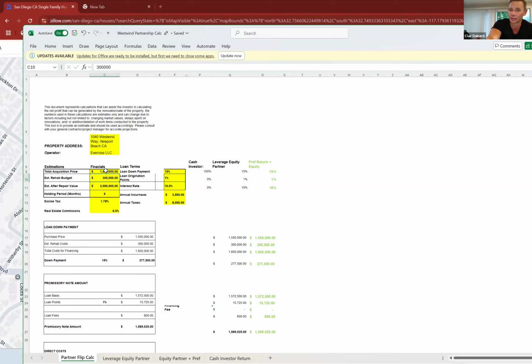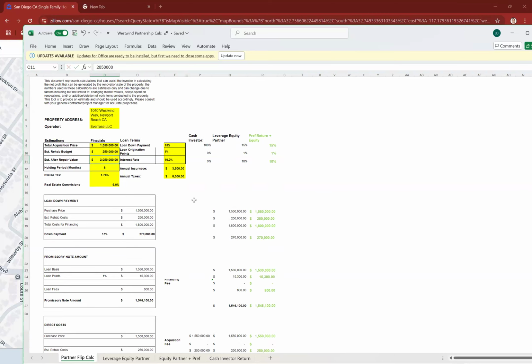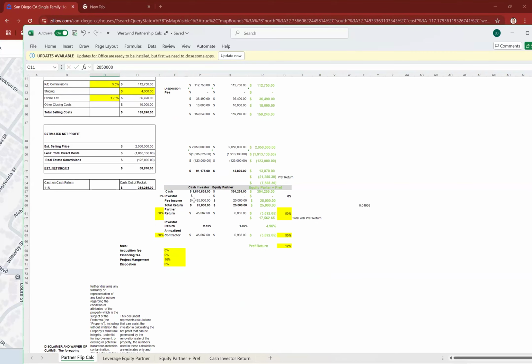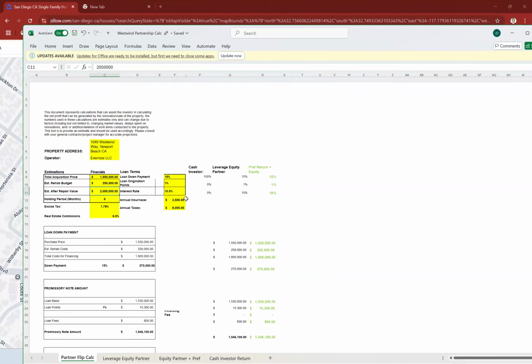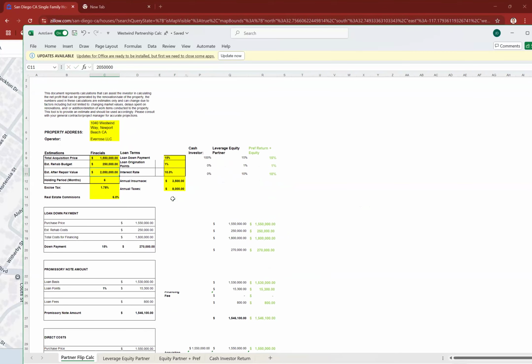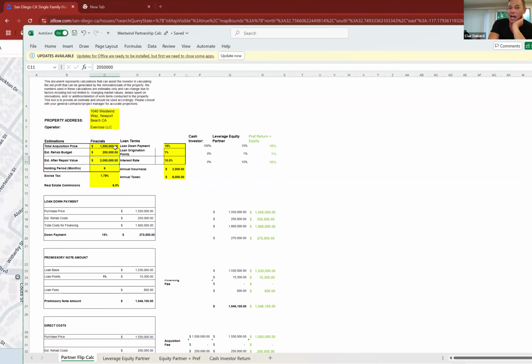What's it cost to renovate 2,000 square feet right there? Oh, not 300 grand. I'd probably say 250. Yeah, 250 on the safe side. It could even be 200. We did that 2,600 square foot house for 230. Okay. So it's not a deal right now, but that's okay. That's what we do, because each market we position it differently, right? Like, okay, what do we need to do to get this price down?